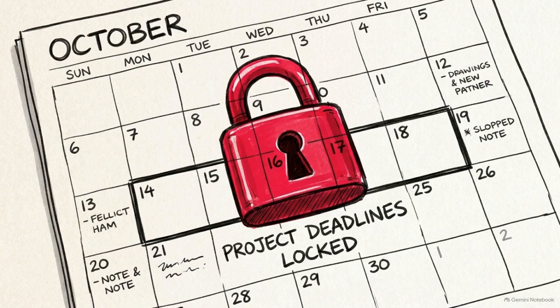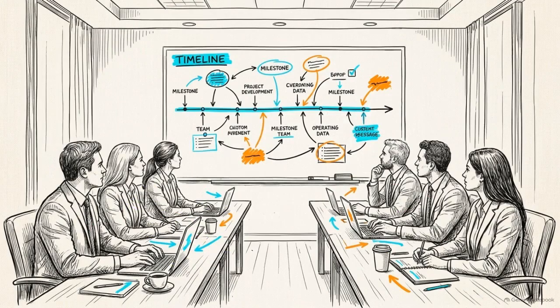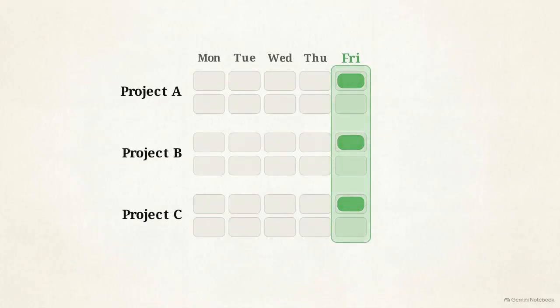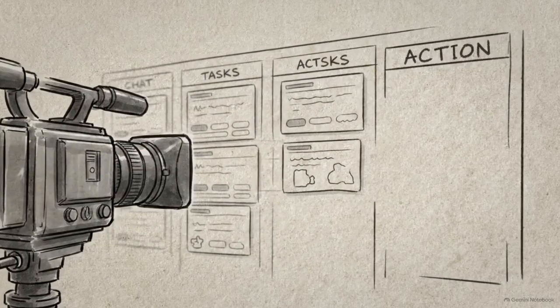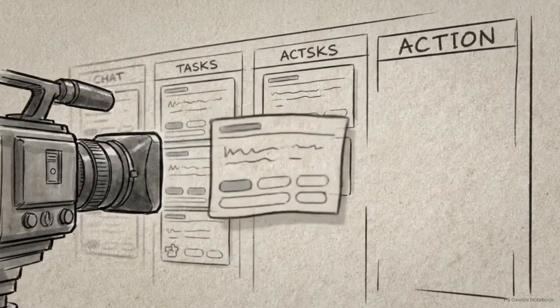It starts with structure. You must construct and lock a master program milestone map before any individual project timelines are allowed to exist. For baselines, the protocol is simple. All local schedule adjustments are banned in favor of mandatory program-level reviews. The interface mandate requires a single named owner for every cross-project handoff. This ensures that responsibility for the connection isn't lost between teams.